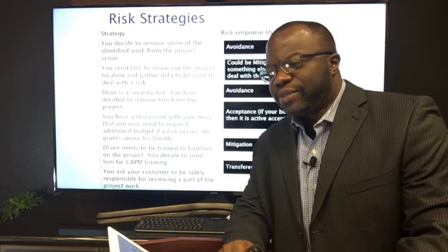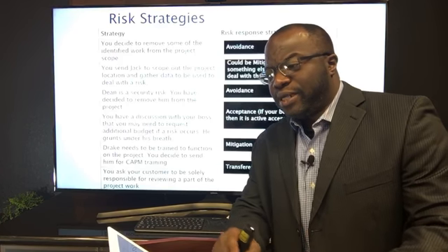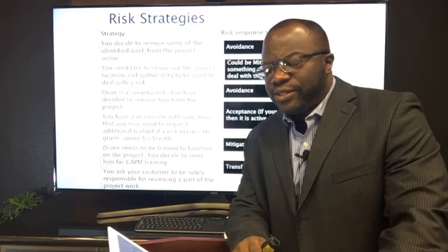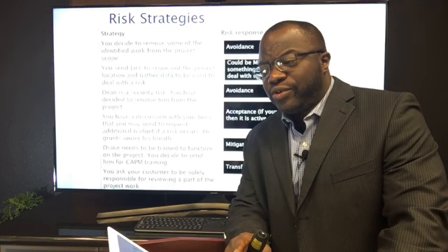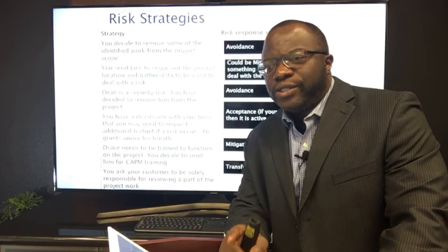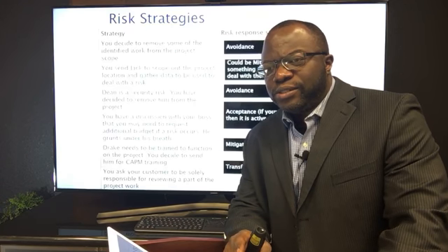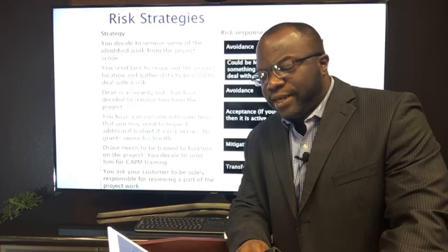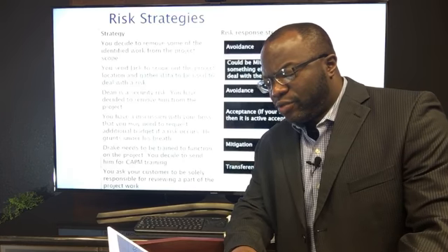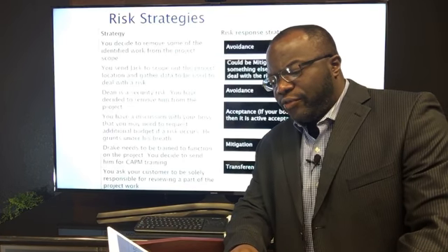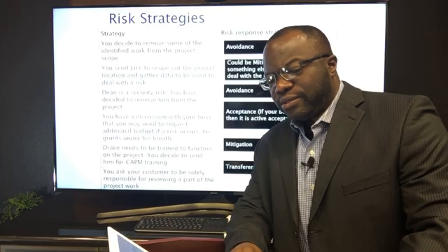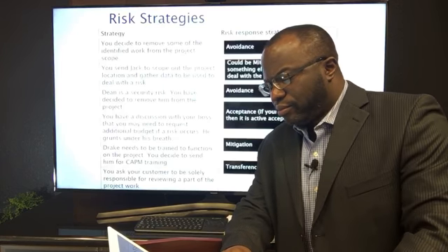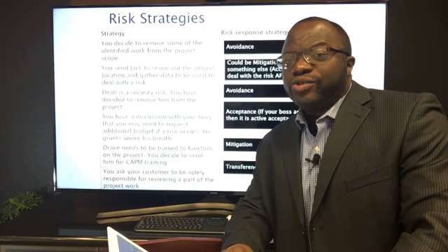Same instance on the job site, there is the possibility that people could be injured. And workers' comp from your company is through the roof. Workers' compensation for injuries is very high. You decide to hire a subcontractor to work on all the scaffolding. What strategy is that? You employ a contractor to work on all the scaffolding, and all your field service engineers and techs are only going to be in supervisory mode, for the most part. That is transfer.